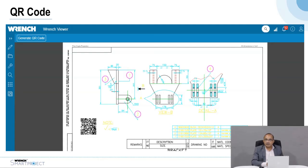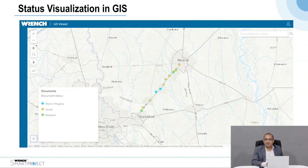The QR code printing feature is powerful: a QR code is printed on the drawing, and when you scan it with the Wrench mobile app, it verifies from the server whether the printed drawing you're holding is the latest revision. This prevents old revisions from being used at construction or during procurement, enforcing quality within the system. The GIS map visualization allows you to retrieve drawings and documents by viewing them on a map, searching by location to see which drawings are to be released and their status.